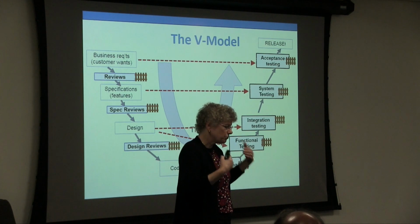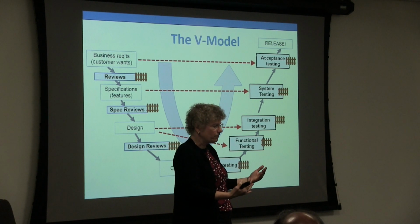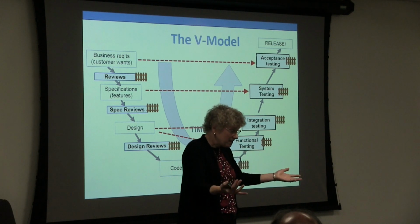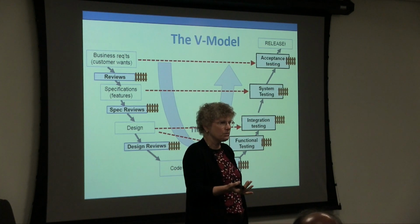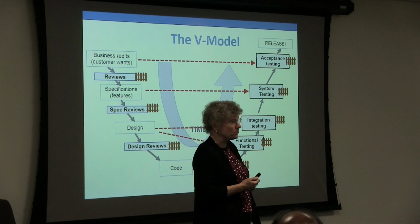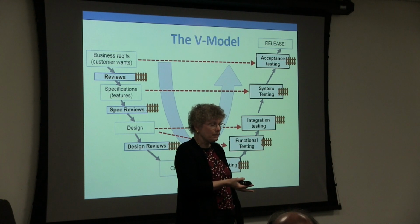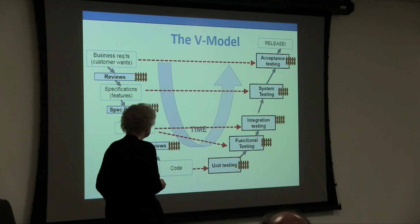I did one product that was a treadmill. It was controlling a treadmill that was being used for a stress exercise test. And we're looking at, well, one of the ways this could hurt a patient is if the treadmill stopped suddenly, or it didn't stop when we told it to stop, and the poor person is having an event, and they're going to fall over, and this treadmill doesn't stop. So we designed in three completely independent ways to stop that treadmill. And we were very glad 6 months later when it turned out one of them wasn't technically feasible that we had two. And the customer had only asked for one. But that's the kind of thing you do when you've got something that's life critical, you're looking to design in ways that you can be sure that it's going to work.